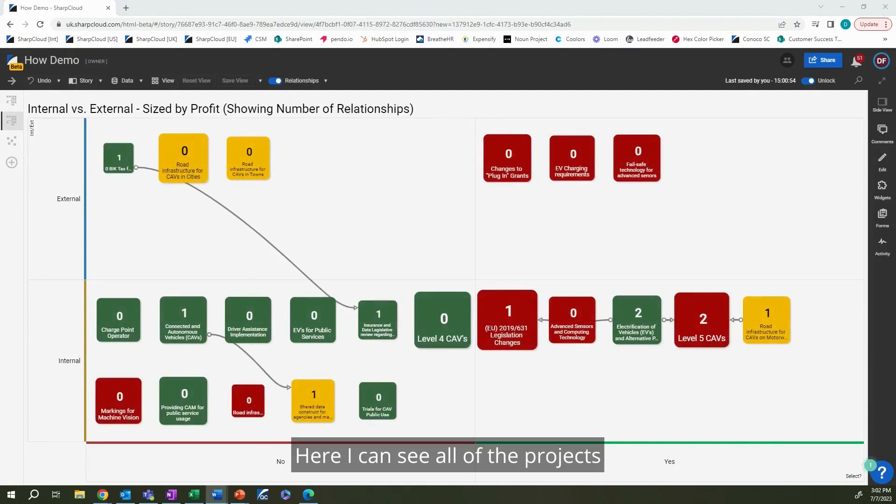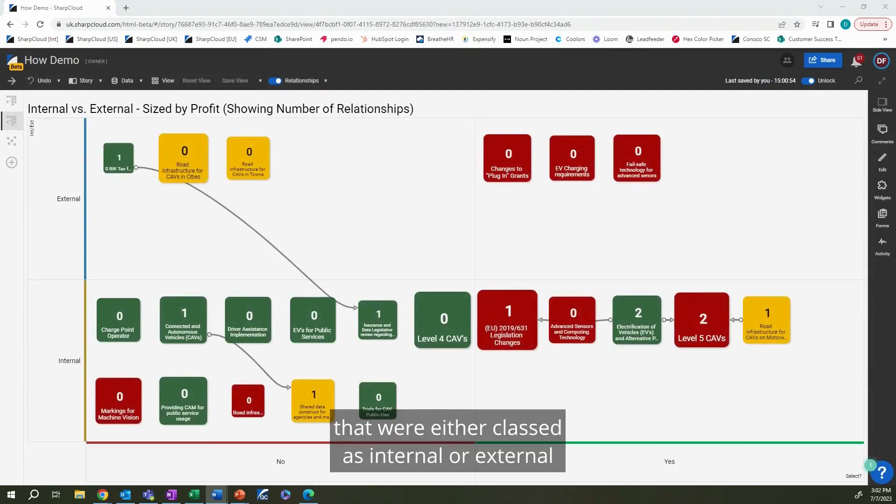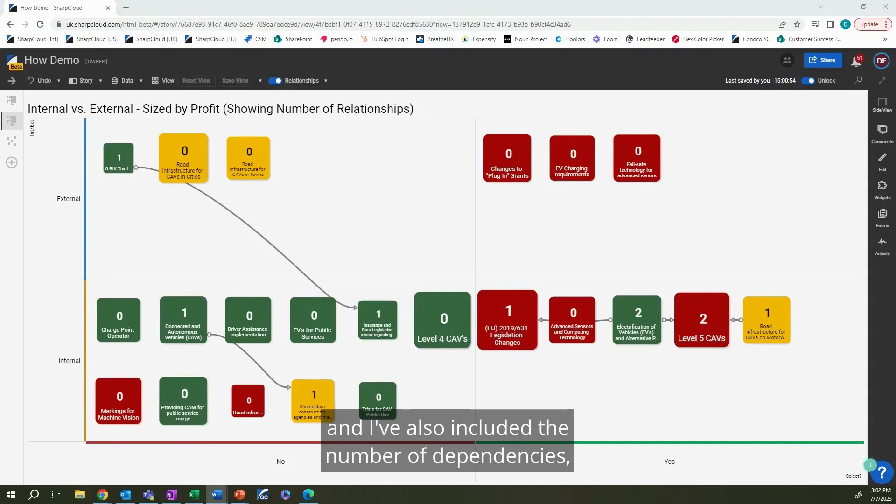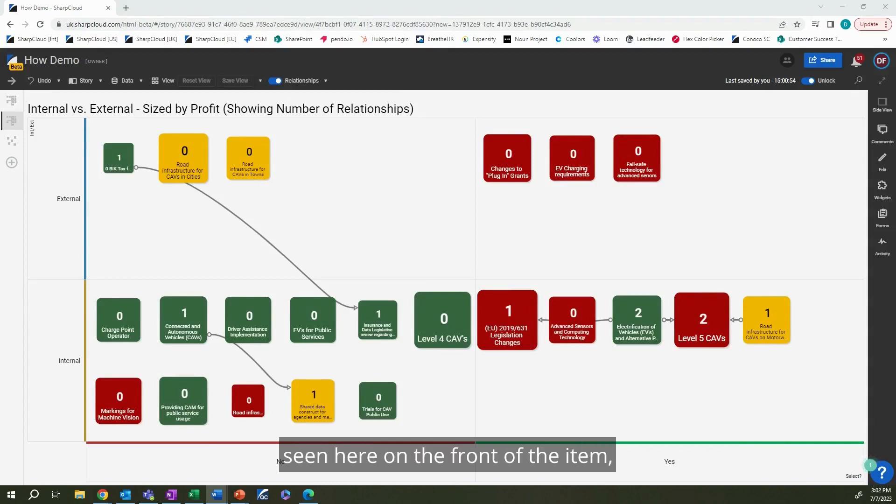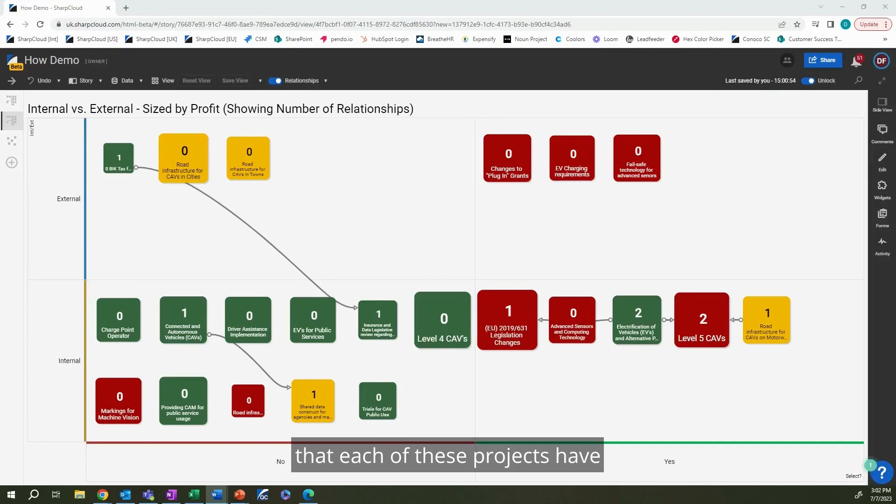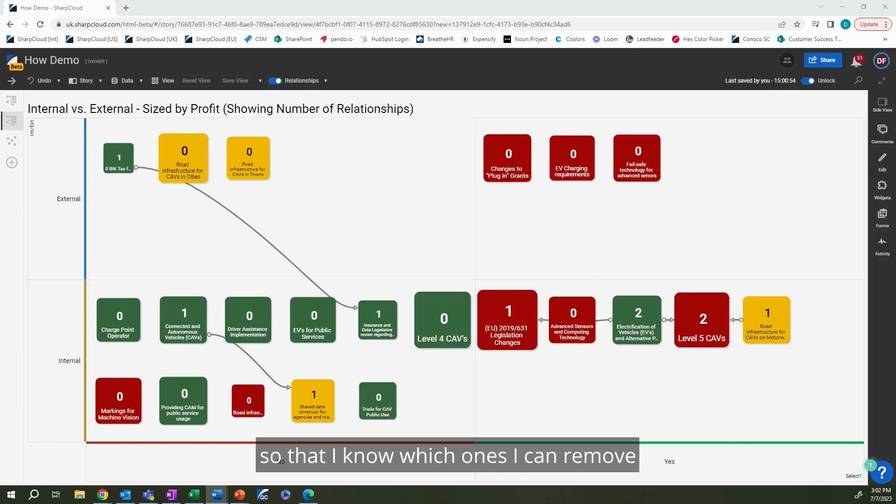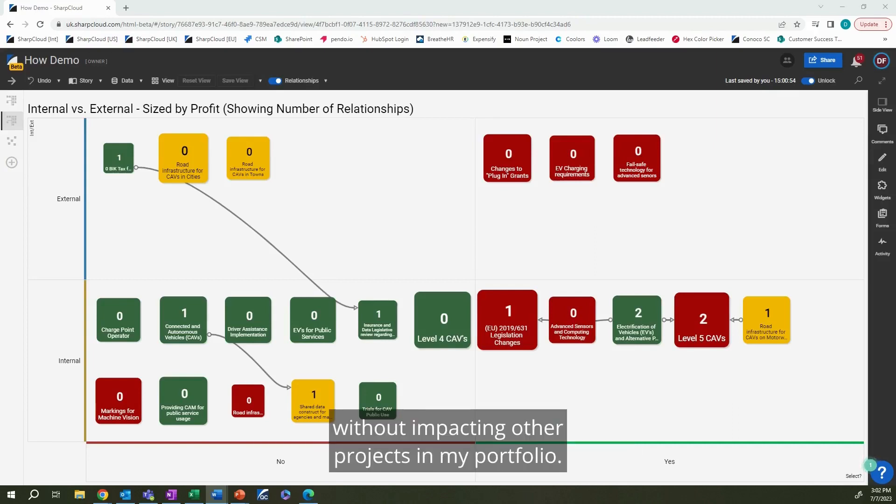Here, I can see all of the projects that were either classed as internal or external, and I've also included the number of dependencies, seen here on the front of the item, that each of these projects have, so that I know which ones I can remove without impacting other projects in my portfolio.